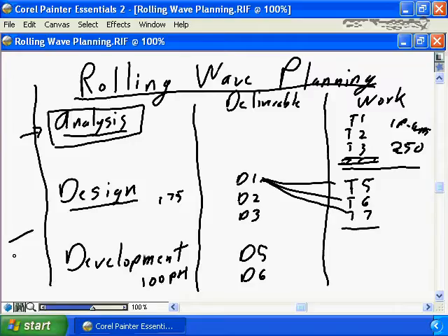But you need to ensure when presenting that total project effort, that 525 number, that you're presenting it in a way that people understand that there's a degree of imprecision, that there's a degree of flexibility in that. When you're presenting the information, you're defining that it's plus or minus a certain percentage, plus or minus 75%. When you're doing rolling wave, it's important that you're presenting that the total project size has been estimated, and you have a certain degree of confidence, potentially not high, because we're simply doing a very high-level forecast of what our further out phases are going to be.